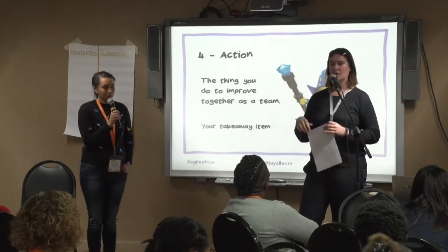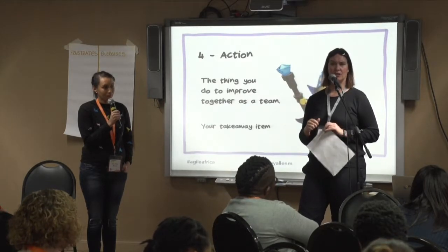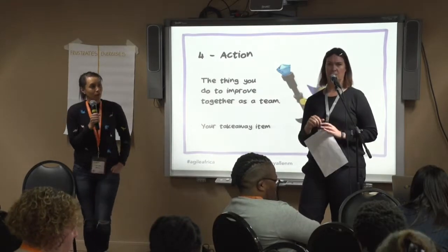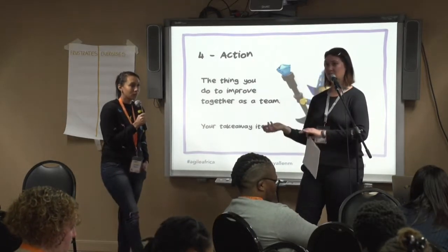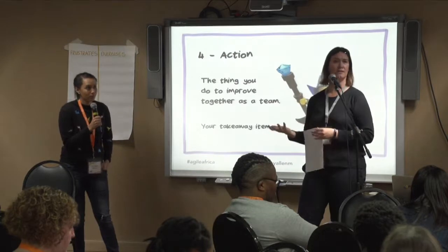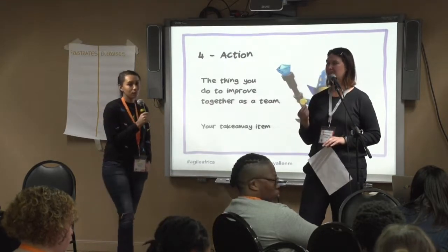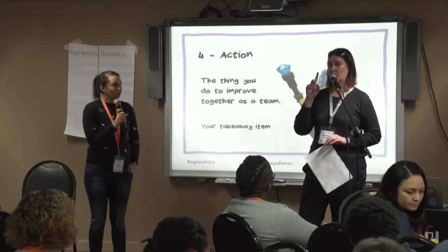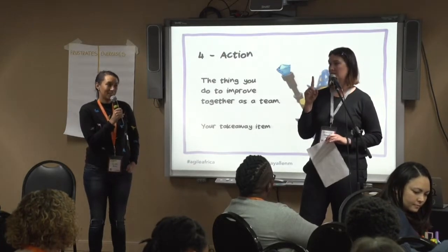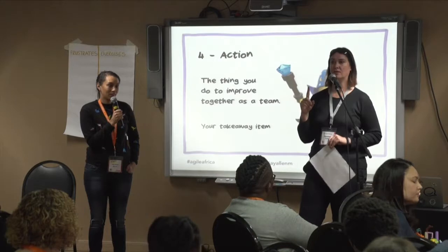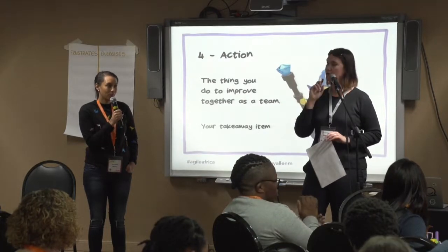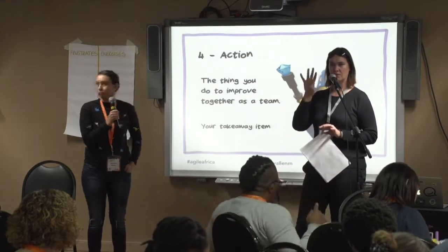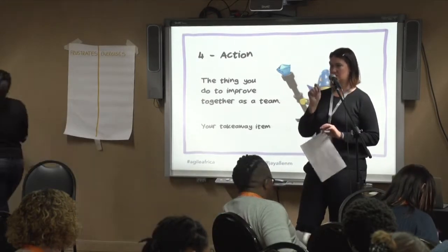So who's going to check up on the better communication? When are you going to check on it? In which meetings are we communicating better? Is it in meetings? Is it outside of meetings? Are we having more coffee? What are we doing? So really get precise and specific, concrete actions. And also one action. I know it's hard. If you want to do the others, do them, but you only write down one and you only focus on one. You know that little Scrum value, focus?